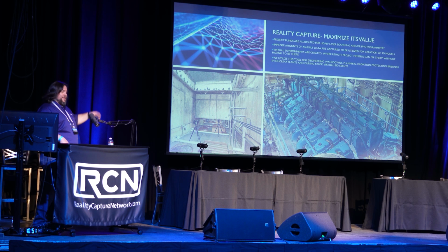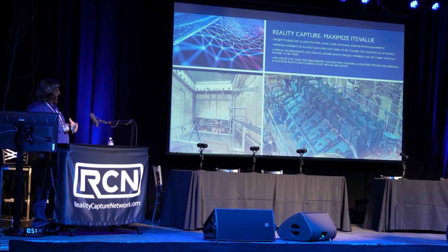having to replace some of the conduit or move it, because we were going to do this online in one of our nuclear power plants, and we don't want to shut them down. They shut down every 2 years typically, and it's for now about only 3 weeks. So we're going to refuel the entire plant, we're going to do major modifications, and you've got 3 weeks to do it. This we're going to do online. There's multiple units, and we're able to shut one down for maintenance and replace it online. So in doing this, hugely beneficial.